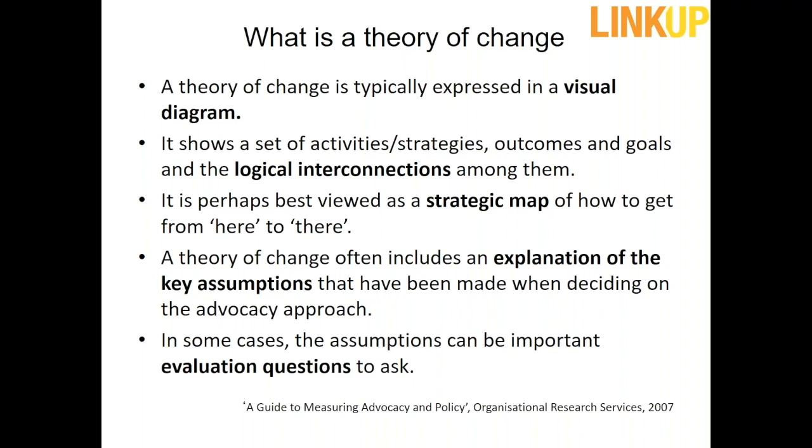And it provides explanations about key assumptions you need to get to a certain point. And also, the last point on this slide, it also provides links to evaluation type questions you might want to ask at the end. What's important is the theory of change is not a work plan and it's not a logical frame. It's much more for monitoring and evaluation of outcomes as you go through. So it's specifically for M&E in my experience, but it's a very, very valuable way, particularly in advocacy, which is very hard to measure quantitatively, but it's a good way of visualizing it. So the next slide, please.